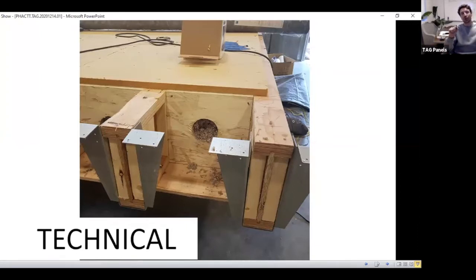Some of these hangers require 20 nails per hanger. And when we're doing this in a dry shop on the ground at waist height, the guys, I'm not going to say they love it, but it's great. Whereas they would have to be up two levels of scaffolding, hovering underneath the steel beam while it's raining with this panel, which can weigh up to 3,000 pounds, hanging above them, trying to nail in 20 nails per hanger. So again, it's these invisible efficiencies that sometimes it's hard to explain to a client, but doing this dry in a shop at waist level is much, much better.